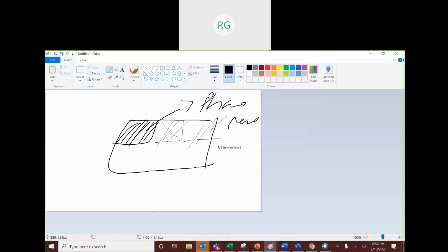So that method of rolling out in small pieces, doing a phase review, and checking with stakeholders: does it meet the expectation of what you really wanted? Are you sure this is how you thought of it? Do you give me feedback? Do you give me UAT clearance? Then we move into the new phase. So every time we finish a small iteration, we do a gate review, talk to the stakeholders, take feedback, and then move forward.